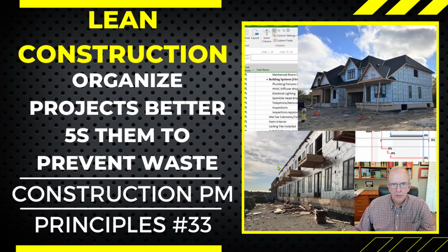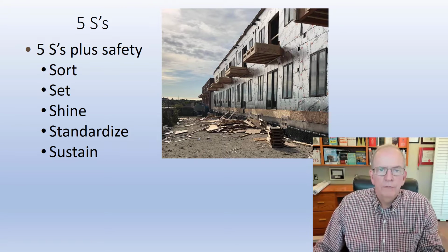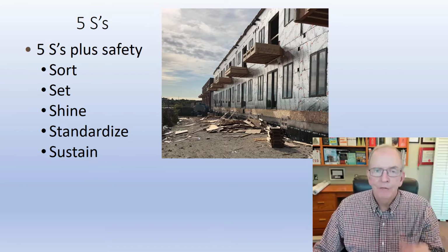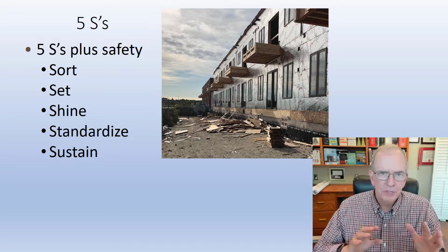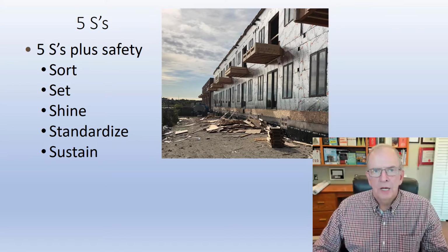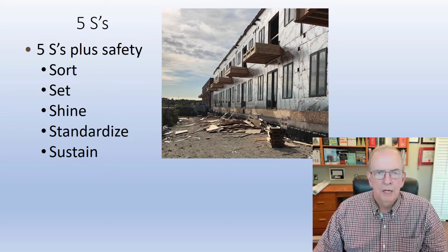Today we're going to be looking at one of the lean construction tools that's pretty renowned, the 5 S's. What do the 5 S's entail when we're talking about construction projects? Well, the 5 S's consist of 5 words that start with the letter S. Now, in lean construction, you might hear some people frame it into 3 S's. Some may add a 6th S for safety, but the 5 S's principally developed out of the Toyota production system and start with sort, set, shine, standardize, and sustain.